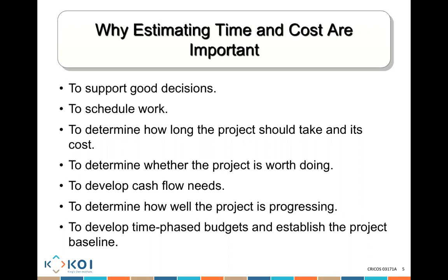We estimate because we want to know how well we are progressing. Are we progressing on time, on budget, or not? We plan to develop a time-phased budget and establish the project baseline. The project baseline is where I save the whole project and say, okay, how much is my whole project going to actually cost me from an estimate perspective? We do that from the beginning, and we try to make that understanding.